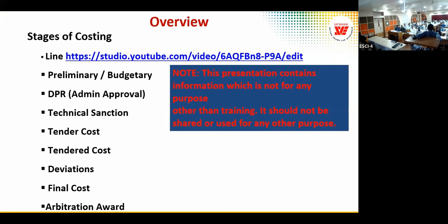And ultimately, sir, when you want to evaluate an architect, you ask him to show 10 projects with the initial three-dimensional view prepared by the architect and a completed photograph of the same project. And see how many variations there are, and ask why those variations are there. He is proposing a beautiful three-dimensional view, but how are you sure the same 3D will be made? So we have to ask. There can be so many subjective things in the evaluation of even an architect. It is experience that proves.